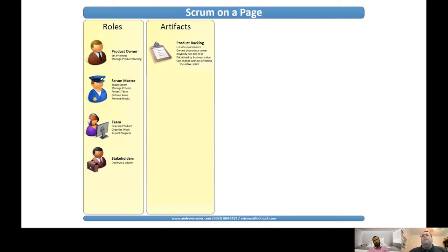There are a number of artifacts that are useful to understand. The first one is the proposal backlog, the product backlog, you could call it. And this is everything that needs to get into the proposal, everything that needs to get done. It is a little bit like a compliance matrix, but it is task-oriented. So that is the proposal backlog. This is everything that needs to get done in the proposal.